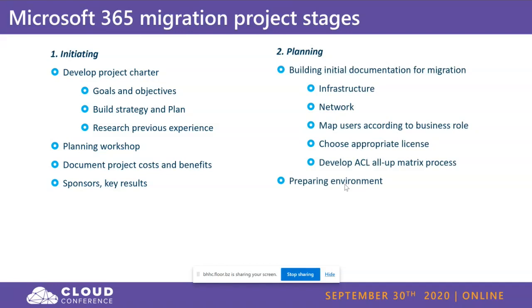Then we have the planning phase. The planning phase means that we really have to build the initial documentation for the migration. We have to audit and look at the infrastructure, for instance, what infrastructure we have in place. From where do we migrate? Do we migrate from an on-premise solution? Do we migrate from other cloud solutions? Do we migrate from Zimbra or from Microsoft Exchange? Everything should be put on paper.